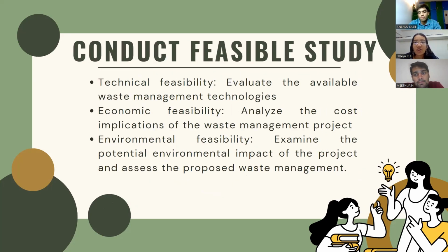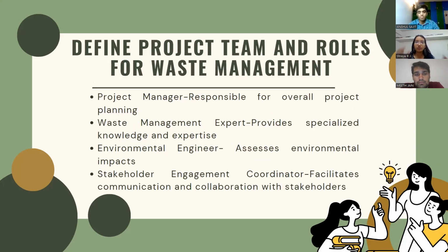Next is conducting a feasibility study. The first kind of study that we will conduct is a technical study to evaluate the available waste management technology. Second will be the economic feasibility to check and analyze the cost implications of the waste management project. And lastly, we will be looking into the environmental feasibility to examine the potential environmental impact of the project and assess the proposed waste management.